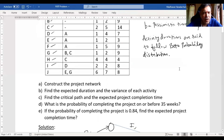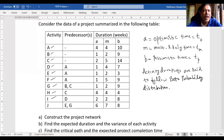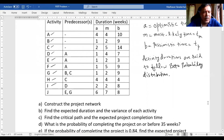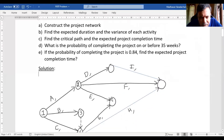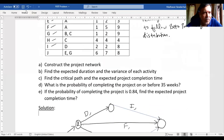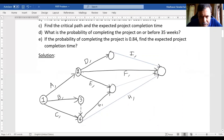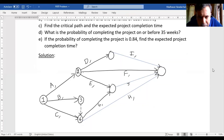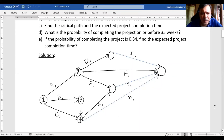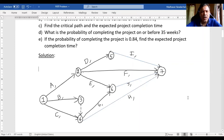Activity J can start on completion of both E and G. Checking the predecessors column, J itself does not appear there, so J also goes to the last node. E and G are both completed at the same node — node 6. From node 6, we draw activity J going to the last node. The nodes are numbered: this node as 5, this as 6, and the final node as 7, giving us a total of seven nodes in the network.